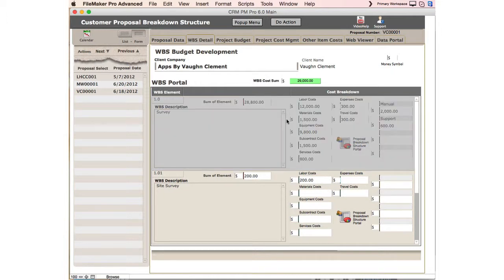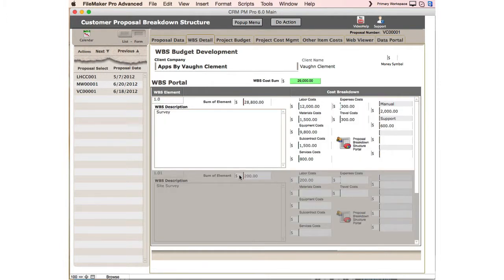As far as actually working the individual pieces in this, this is how you do it. You add the pieces until you get them totally covered as far as the cost for the proposal. Now this is at the cost level. It does not include G&A, profit, and all the other aspects of what you're going to put into it. So this is the cost proposal from your project team and project managers.